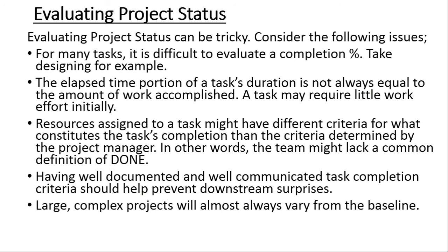But the manager knows that the first 1 meter is very fast, but the second 1 meter is slow, because now you are starting to fit the door frames, the window frames, the air conditioning ducts on top, and so forth. So there might be that variation between the understanding of completion of the resources that are reporting the progress and the definition of the project manager.